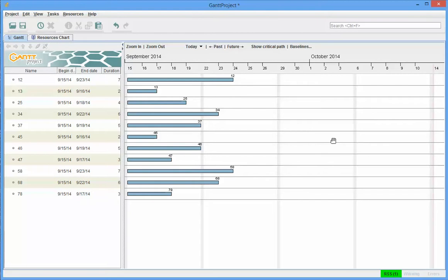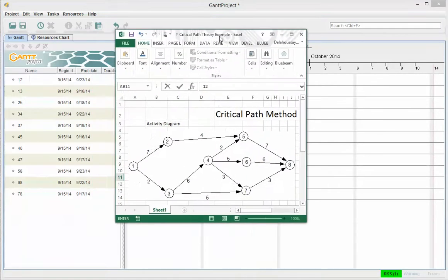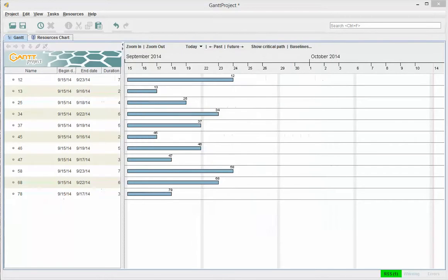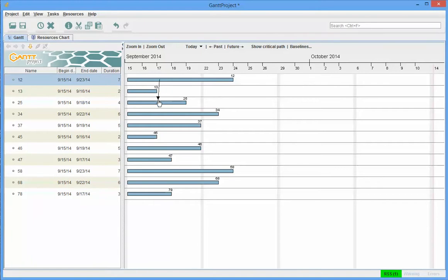What we need to now to do is recall that our project not only has activities with names and durations, but there are time dependencies. And so we need to build in those time dependencies. Okay, and the way this system works is for a given activity, I can define a predecessor relationship by dragging a link from the first activity to the second activity. Actually, I've never tried it in reverse, but activity 1-2 precedes activity 2-5.